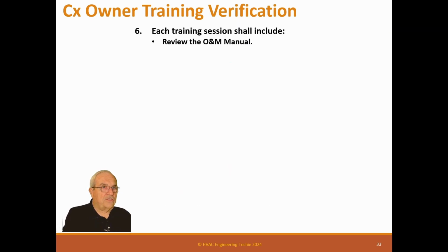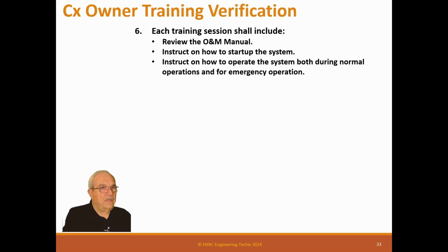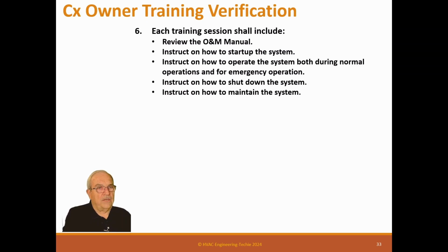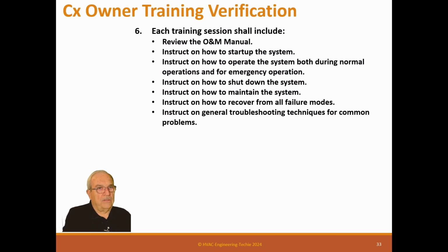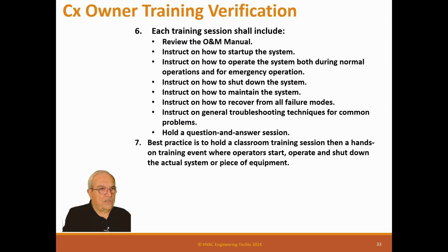Each training session shall include review of the O&M manual, instruction how to start up the system, instructions how to operate the system both during normal and emergency operations, instruct on how to shut down the system, instruct how to maintain the system, instruct how to recover from the failure modes, instruct on general troubleshooting techniques for common problems, hold a question and answer session.